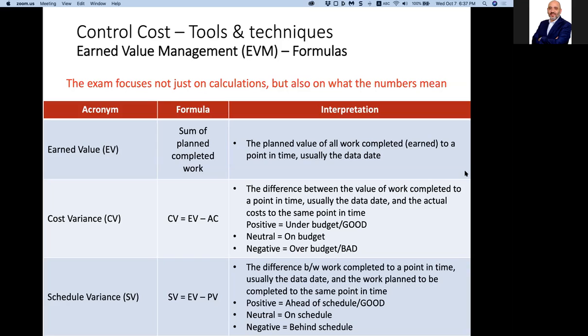It's based on the volume of work that I delivered from this project. Unless you work cash based accounting, then you record each invoice as revenue. But if you work accrual based accounting, then you record how much you have earned from the piece of work, and you recognize it in the books as revenue because you've earned it. The same concept here applies in earned value analysis.